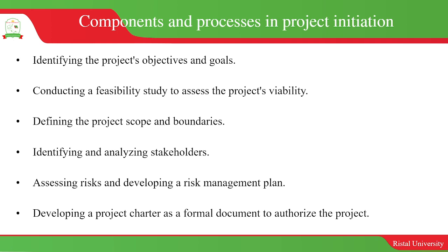So basically, in the phase of project initiation, we have looked at the part of getting the ideas and how you evaluate the ideas. Now, assuming you have narrowed down on the idea that you want to turn into a project, this is what we are going to look at in a sequence. You need to set the project objectives, goals, conduct a feasibility study, and then come back and redefine the project scope and boundaries, identify the key stakeholders, assess the risks and strategies to manage them, and then develop the project charter. So these are the activities in the project initiation phase.